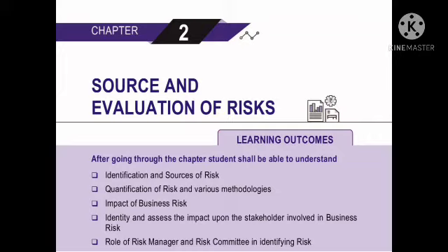Similarly, if the impact is significant, it can be assigned a weight of 1, and where there is no impact, the event can be assigned a weight of 0. Uncertain risks are assigned between 0 and 1, viz., 0.5. The maximum risk impact the event could generate is 1, and in case of uncertainty 0.5.